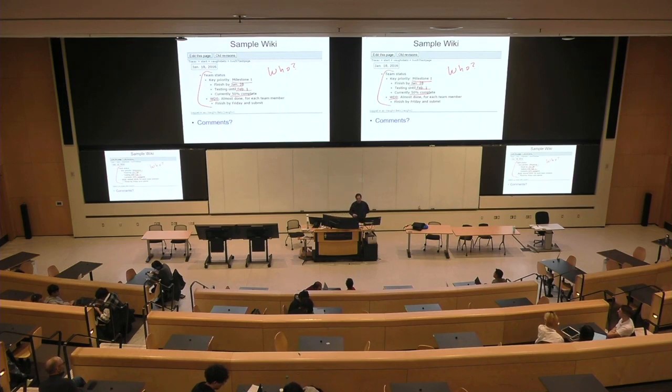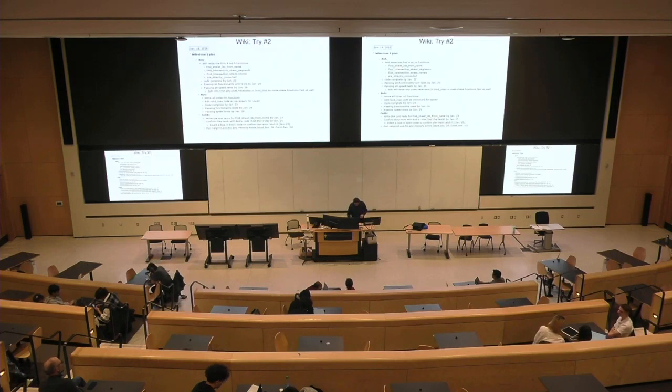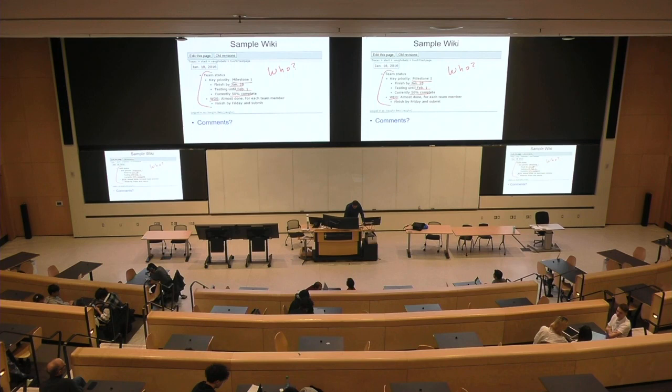Also, you said who does what, so it's not very concrete either. The tasks are too big. The tasks are complete milestone 1, and then test milestone 1. So it's not very granular and hasn't assigned them to people. So it's not good, right? It's not very precise on what tasks. It does have target completion dates, but basically there's not enough tasks. It's not broken down enough.